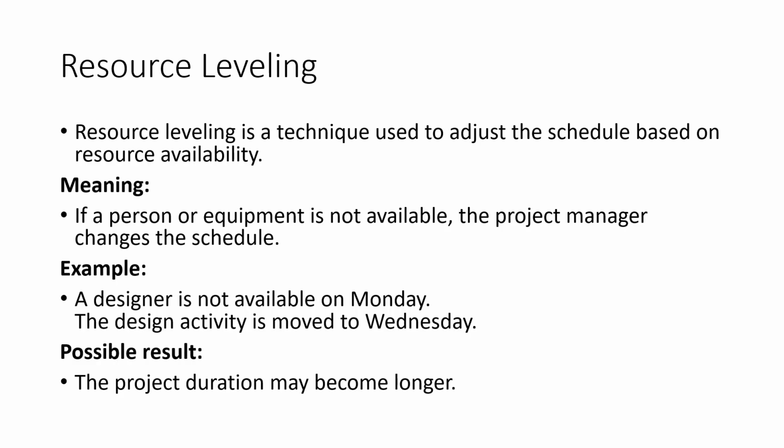However, one possible result is that the project duration may become longer. This is because some tasks may need to be delayed until the required resources are available. So resource leveling is useful when resource availability is more important than maintaining the original schedule.